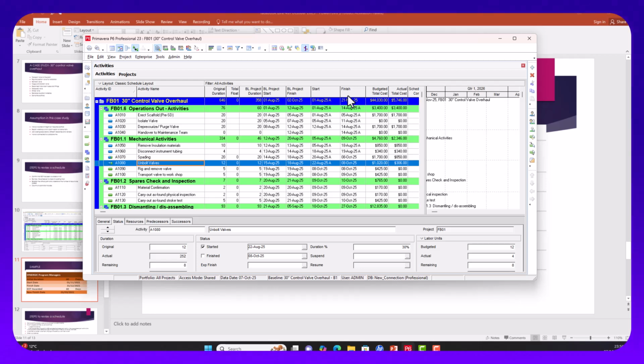Now we have gone to the client to say, clients, there was a demonstration at site, community disturbance and what have you, so we cannot continue. There is a force majeure. We cannot continue with this project to arrive at the same date. We've checked our calendar. We can't change shift. The government doesn't allow us to do some things, maybe heavy lifting at night. So we want extension of time based on our contract.